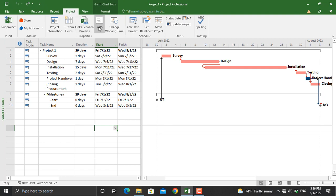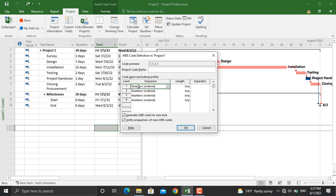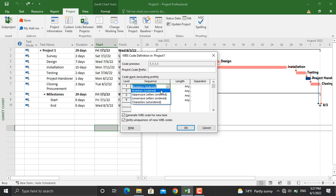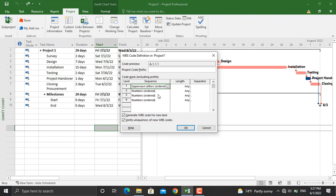In here you can assign characters, letters, and numbers to different levels of hierarchy in your WBS. For example, number one, in here I want to see uppercase letters. And for number two, which are these activities at the hierarchical level, from here we will define numbers.